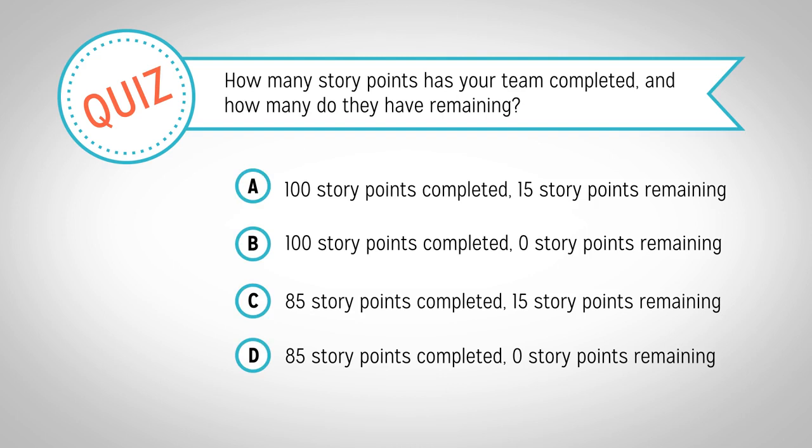In this project, there were 100 total story points. We know this because there were 100 story points at the beginning of Sprint 1. At the beginning of Sprint 6, which is the last sprint of the project, there are 15 story points remaining. Since we started with 100 and have 15 remaining, the team has completed 85 story points. Therefore, C is the correct answer.